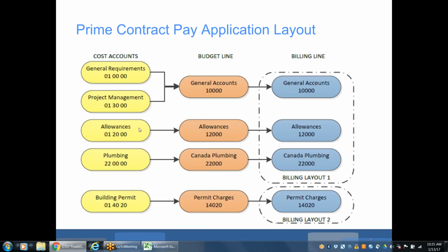But if you wanted to start linking multiple to other accounts, like for example a subcontract, as an example, your concrete is going to be subcontracted, and at that point you want to select multiple cost accounts, we do definitely recommend that you have that discussion with your cost accountant.